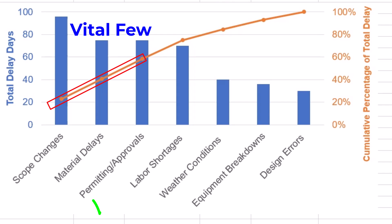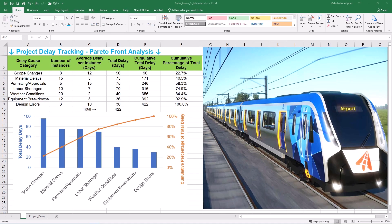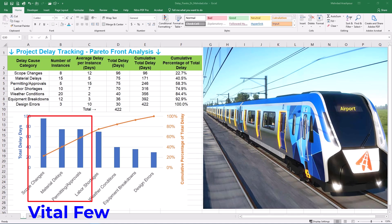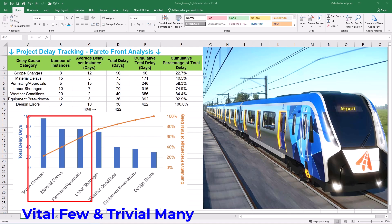To mitigate project delays from permitting and approvals, engage regulatory authorities early and maintain ongoing communication to understand requirements and timelines. Allocate dedicated resources to manage documentation, track approval status and promptly address feedback. Incorporate permitting milestones into the project schedule with contingency plans for potential delays. Remember, Pareto analysis doesn't mitigate delays itself — it's a diagnostic tool that pinpoints problem areas and guides us to ask the right questions and focus problem-solving where it has the greatest positive impact. By tackling the vital few delay causes, we can expect the most significant reductions in overall project delays.